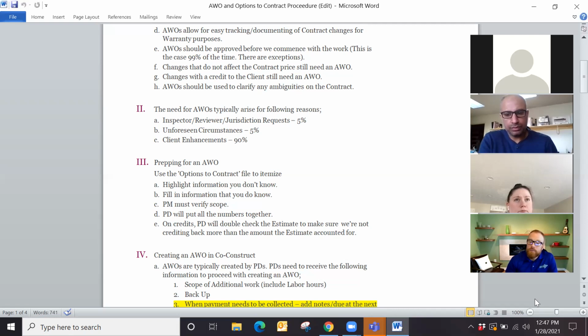If the county does call out something, or we run into, for instance, pipes running through the wall that we could not possibly have known about, going to a second floor bathroom when we take out a wall, if there would be something in that contract that would say so under plumbing or under demo, we would feel so much better talking to the client.